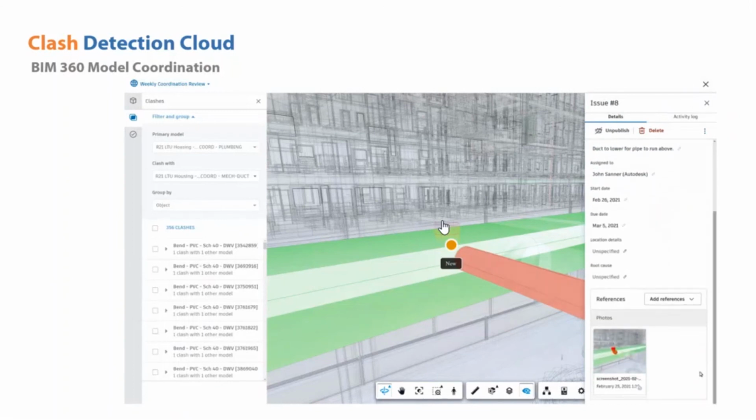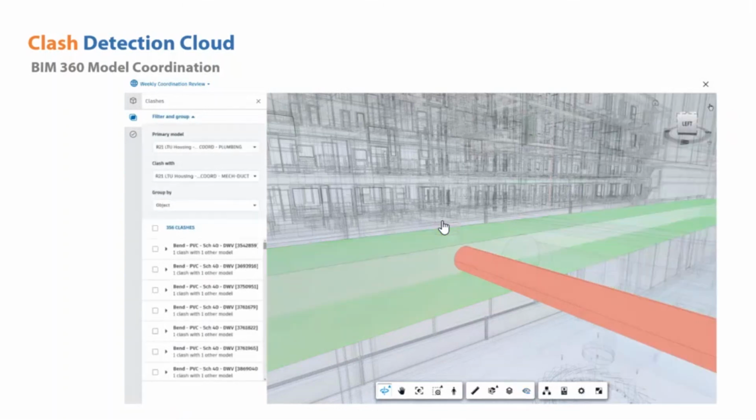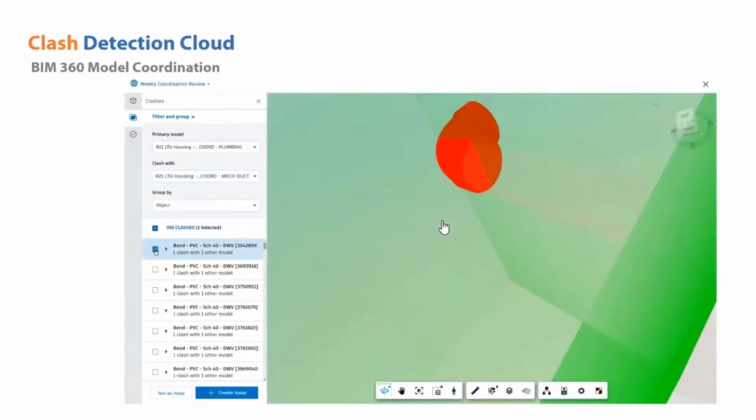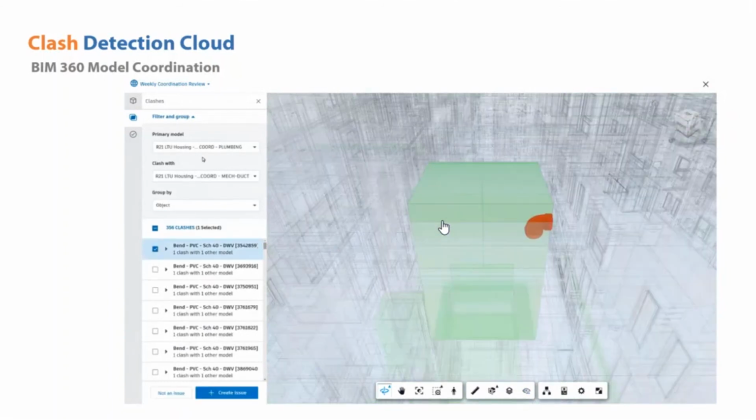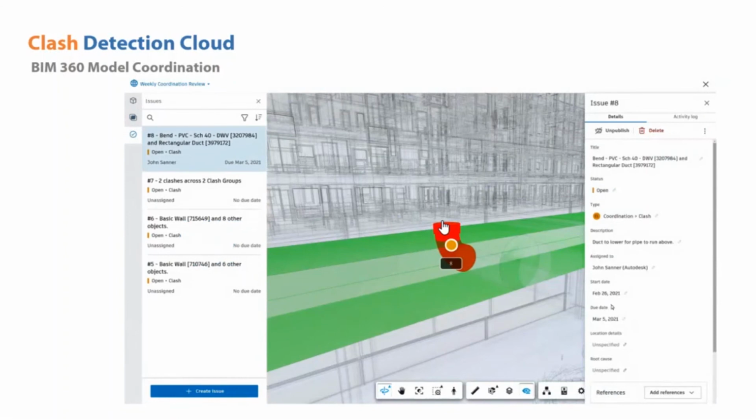and the BIM manager or the coordinator can assign it to team members with enough information: to whom the issue should be addressed, what the due date will be, and such kinds of information can be assigned and sent. The advantage here is that project team members get a real-time notification through mail, hyperlinked to the specific issue part of the project, so that they can work on it to resolve the issue on time.